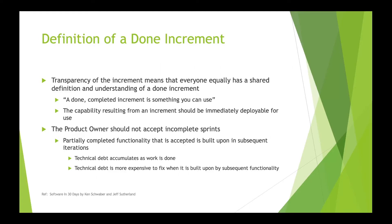This is sometimes referred to as a potentially shippable increment. Done means that the increment is 100% complete. Partially completed backlog items that are accepted prematurely will likely result in technical debt, since unaddressed implementation and quality issues will be built upon in subsequent iterations. In order to ensure that high quality value is consistently delivered while minimizing technical debt, the product owner must ensure that the definition of done is satisfied before the increment is accepted.